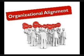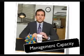So I want to just reiterate that you must have goals and objectives for these projects. And then also have the communication tied to the organizational alignment, and also your champions. Make sure that your physician champion is well respected by a cross-section of the facility. They need to be an opinion leader about the topic, must be accessible to the majority of the stakeholders, and they must be able to dedicate time to this project. Engaging your physicians through your physician champion is going to be an asset for you.